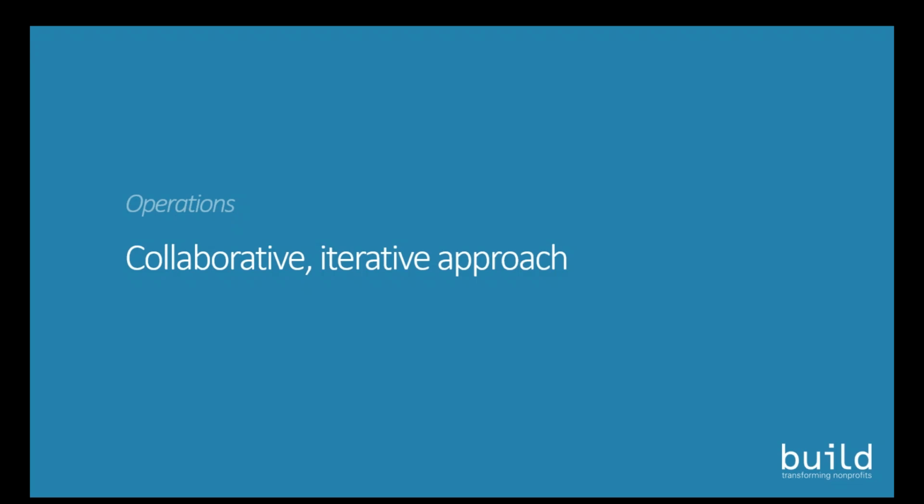For agile projects, for example, it's very important that stakeholders are frequently available to participate in design reviews and user testing, sometimes on a weekly or more frequently than weekly basis. And this also means committing the necessary time to make business decisions outside of those sessions within accelerated timeframes compared to what the organization is accustomed to. So you really have to be properly geared up for that in order to undertake a pure agile process.